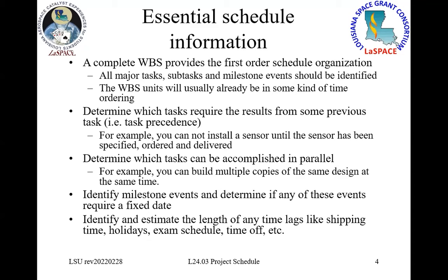Shipping. You can't necessarily get everything you need instantly. You're going to have to order something, and it's going to take some time to ship. So you may not have that. You're going to have some downtime in waiting for parts to come in. So that's a lag, a shipping lag.